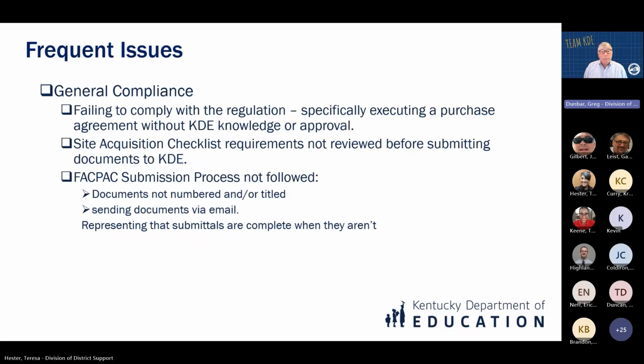Okay, here are the frequent issues that we encounter. General compliance: failing to comply with a regulation, specifically executing a purchase agreement without our knowledge or our approval. Site acquisition checklist requirements not reviewed before submitting them to us, and we have to turn around and send them back to you. Not following the FactPack submission process: documents are not numbered or titled, or sending documents by email outside the FactPack process, or representing submittals are complete when they aren't. Next slide.